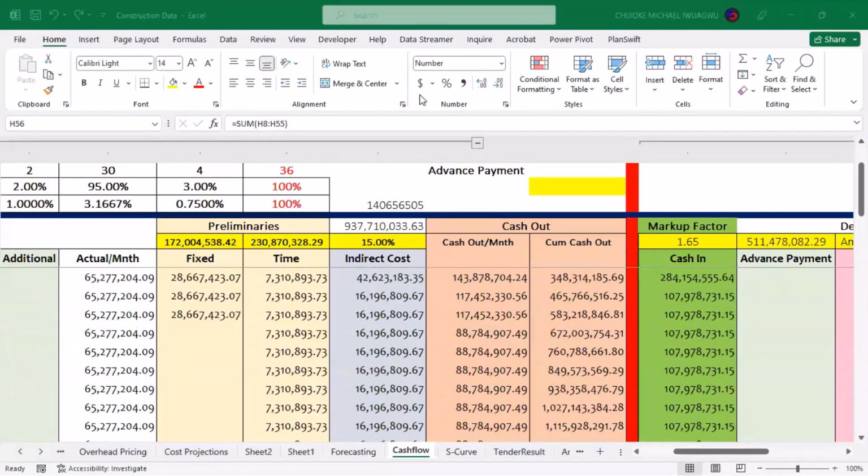So we have our QS, Leo, here. He says, sir, when forecasting for building materials, for instance cement or reinforcement, is it applicable to use these values when adding up a rate? Thanks. If you want to forecast the price of materials, it might not be wise to use these things only for one particular material, because the inflation rate may not be directly affecting that material.